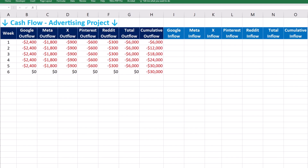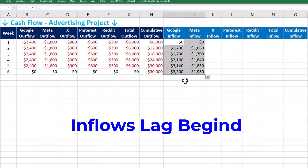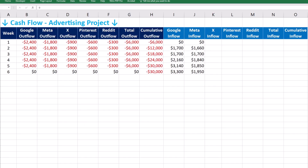Now let's focus on inflows, or revenue from conversions. Inflows usually lag behind ad spending — there is a one-week lag for Google and Meta. In week 6, there is no spending but revenue is still coming in from the ad spend of previous weeks. That's important because it shows the campaign continues to generate revenue one week after it's officially finished.